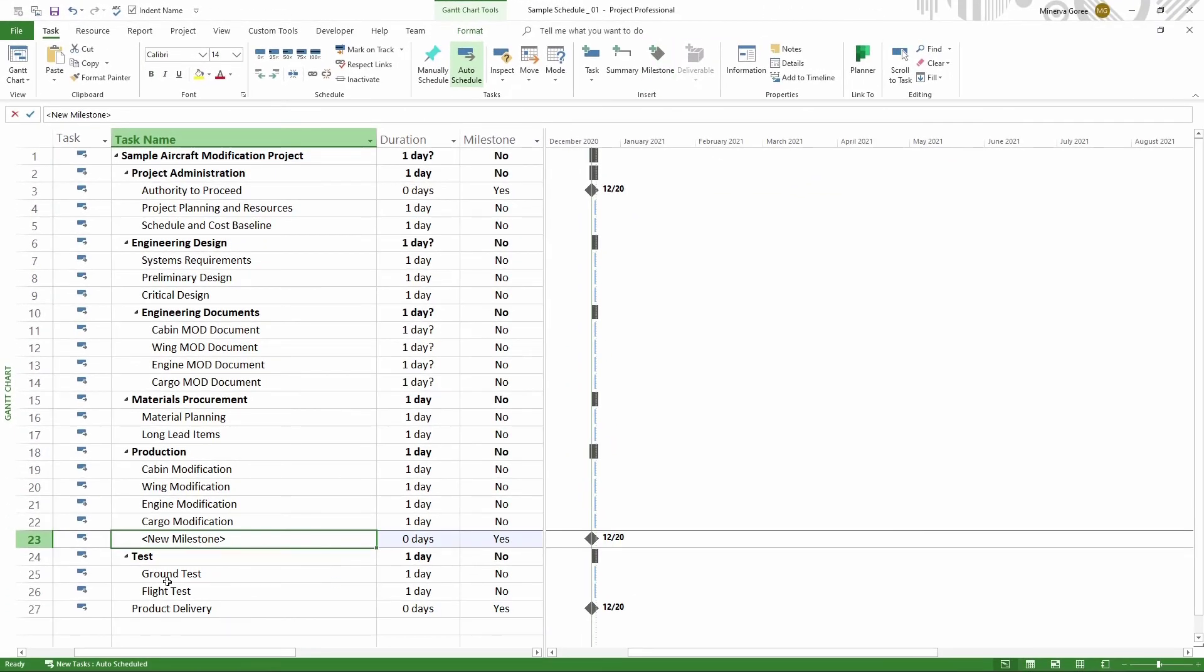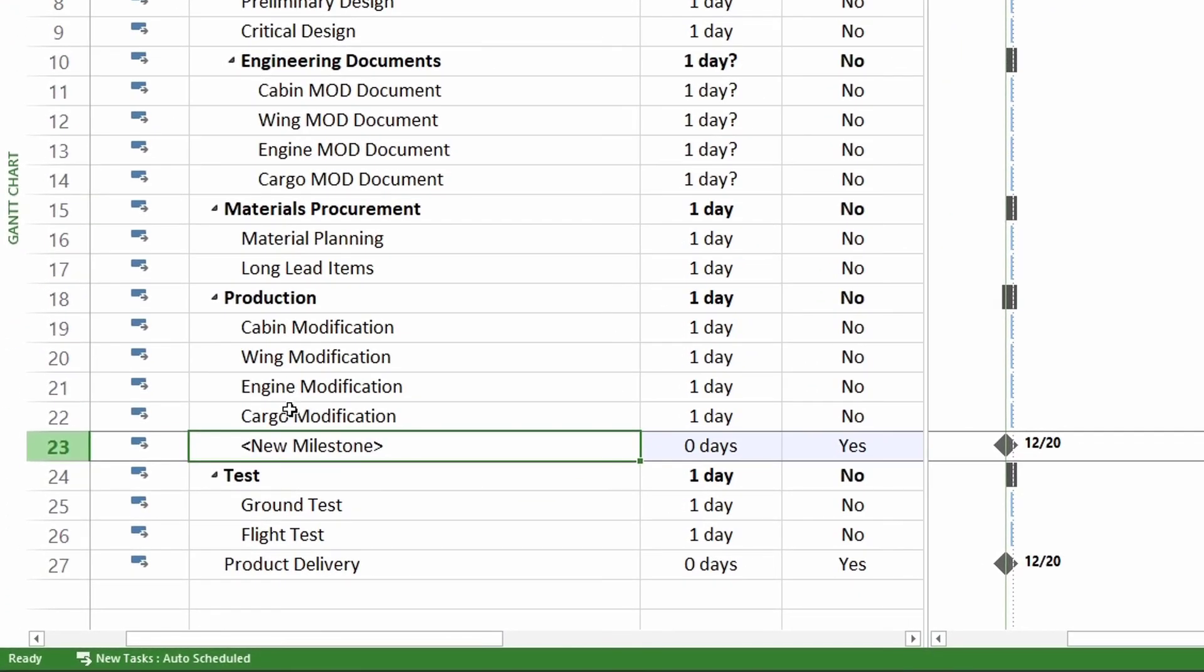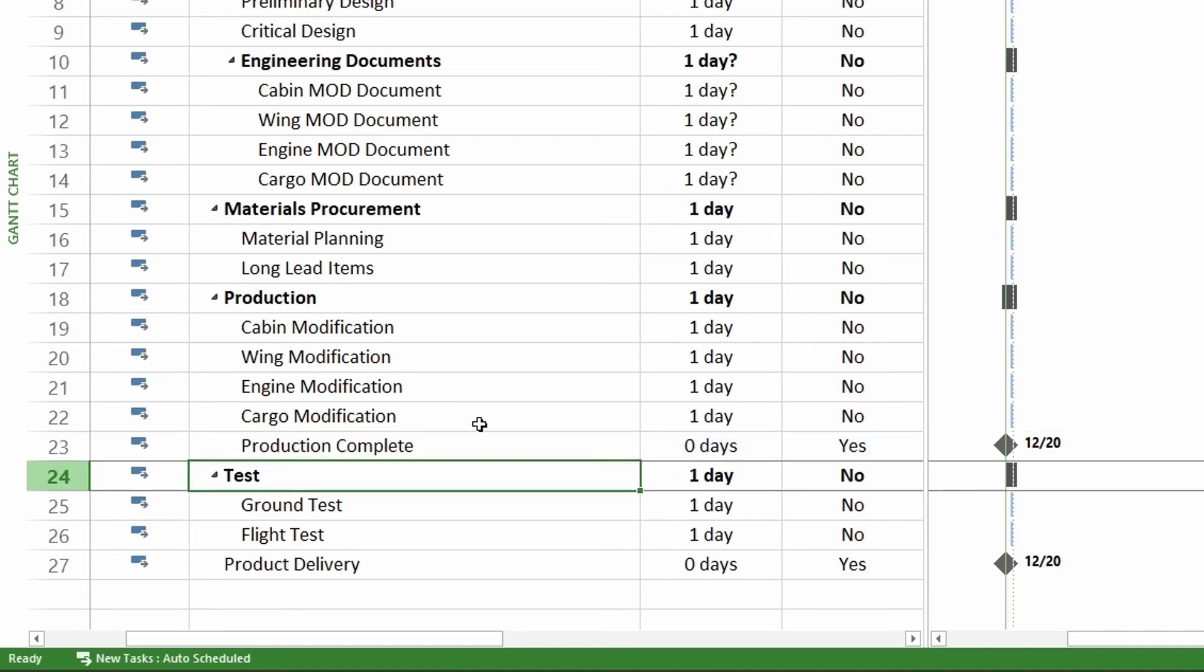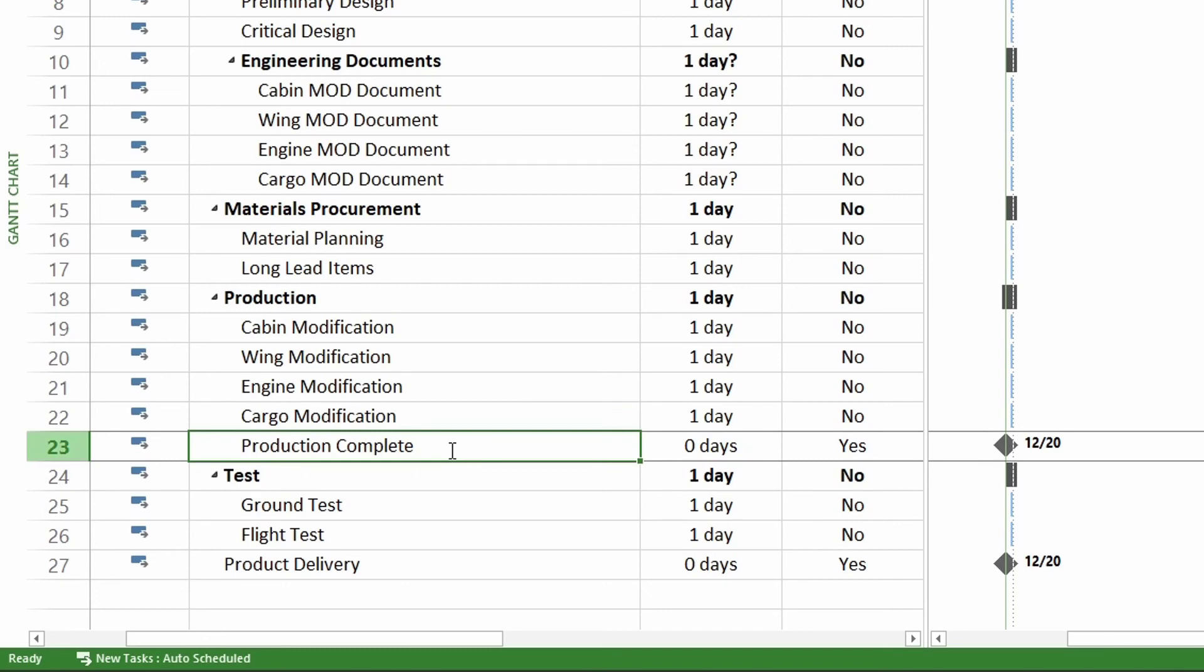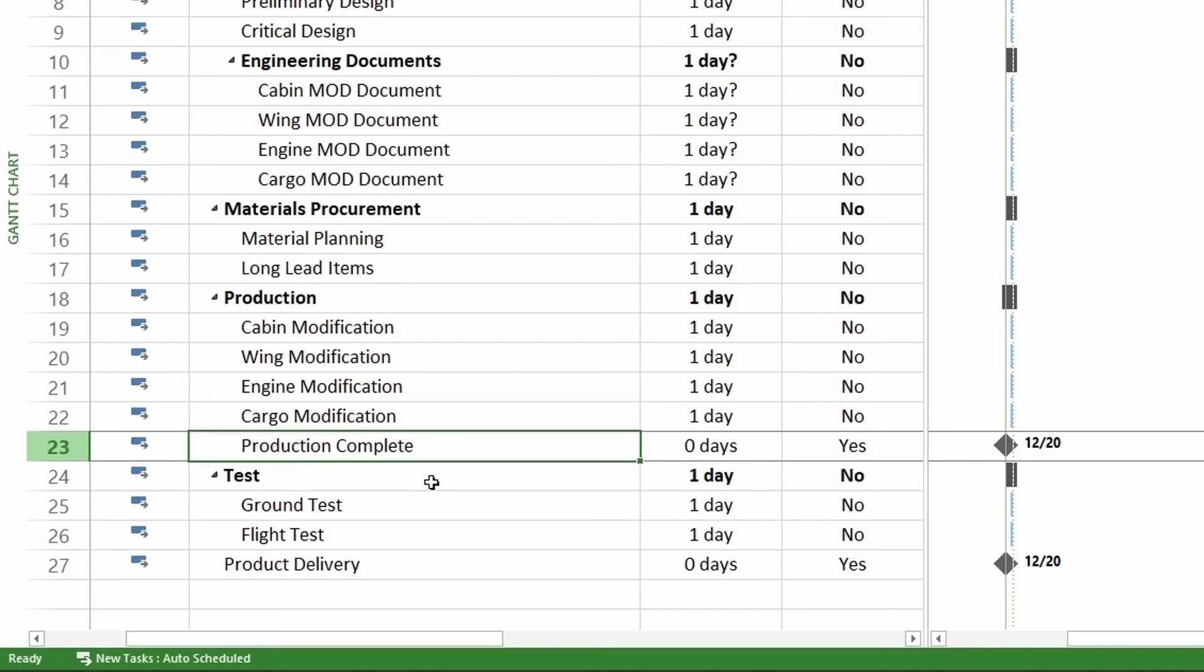So we're going to click on it. And now you see I have this new milestone right under cargo modification where I wanted it. And you can see here in the Gantt chart, it's now a diamond. So right here, I'm going to write production complete. And now that will be my milestone for my production complete. When all of these is completed, I'm going to want that. Right now, I do not have any logic in the schedule. So they're not connected. But once I connect it all, it will make more sense in the Gantt chart. But that's for a different lesson in the future.